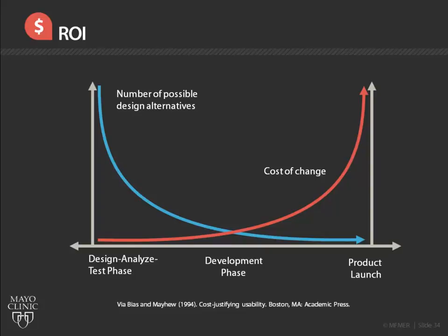At the beginning of the project, there's a comparatively large number of possible solutions that might be right for this problem. As these solutions are created and tested, the pool becomes smaller and smaller. When there's relatively few choices, that's the right time to bring in the much more expensive development resources, because once problems are discovered after this point, they become increasingly more difficult to fix.